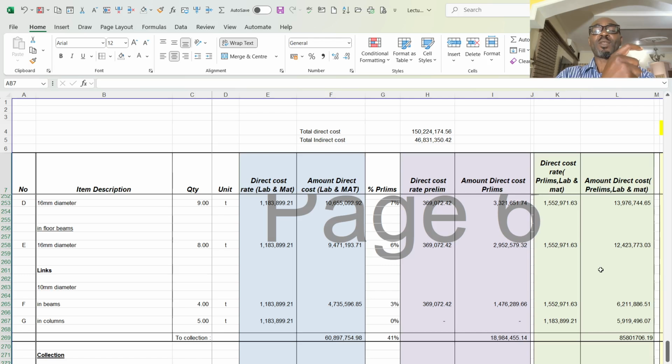So I will want to center my discussion on, say, a measurement contract where the client is saying, I want a bill of quantity, but I don't want to have two separate bills, say the bill for the preliminaries and the bill for the main works. He wants the preliminaries to be distributed evenly into the works so that whenever payment is made, some portion of the preliminaries will be paid for proportionally to the job that you have carried out.